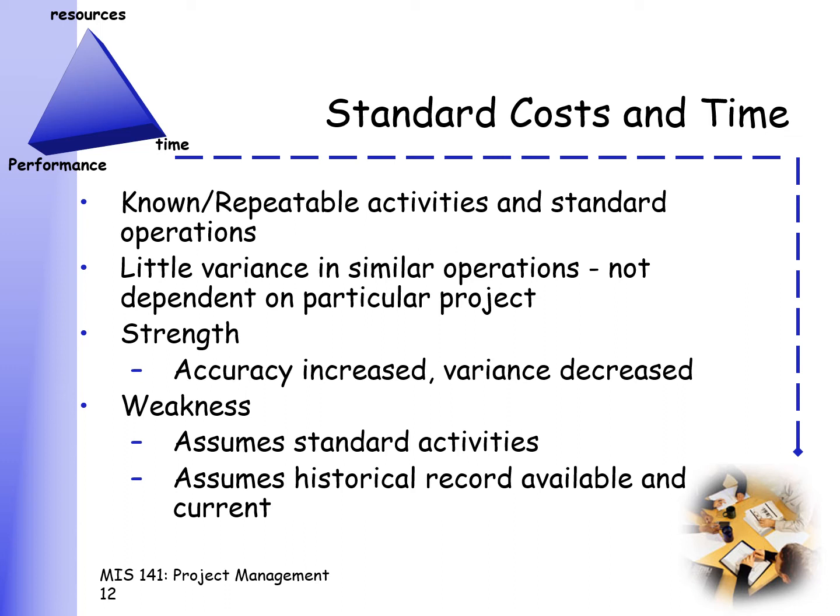Okay, so industry will say, okay, if you have a website and it's this particular configuration, by default, it will take you X number of days. This can be done because there's a lot of people who have done it previously. And if a lot of people have done it previously, then more or less, given the same specification, you should take the same amount of time. Also, there's a lot of assumption there.